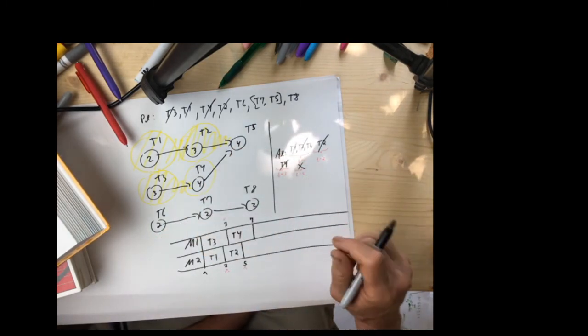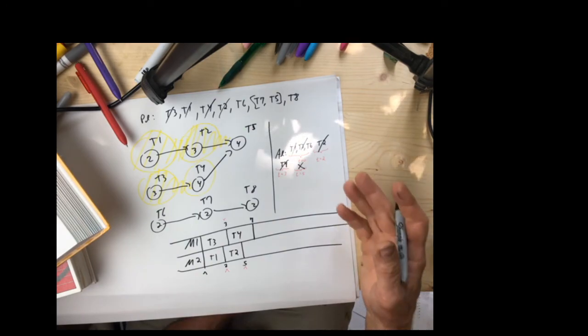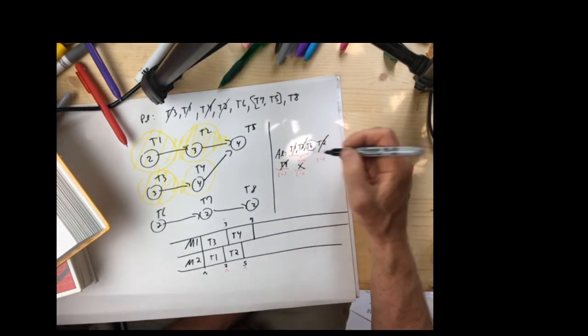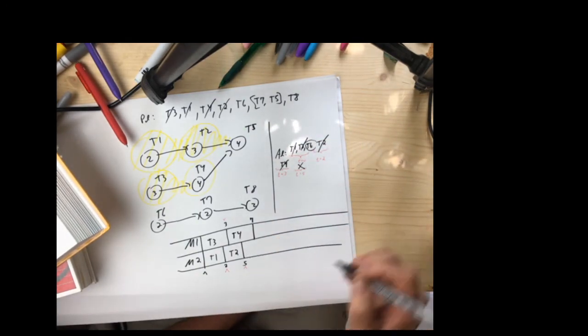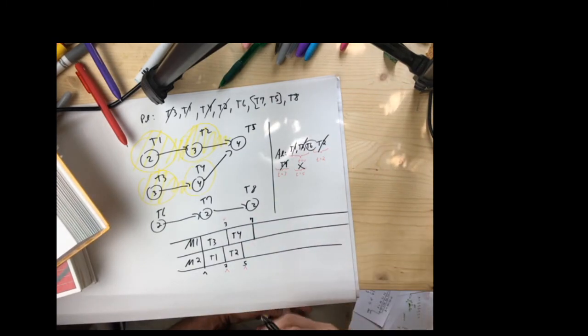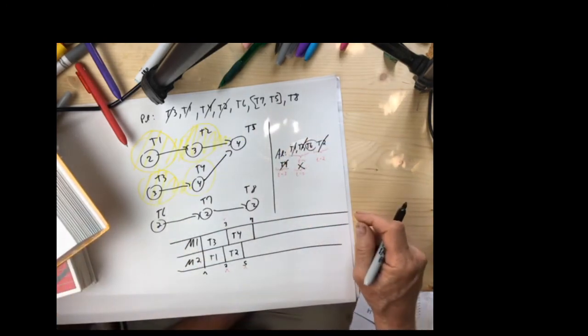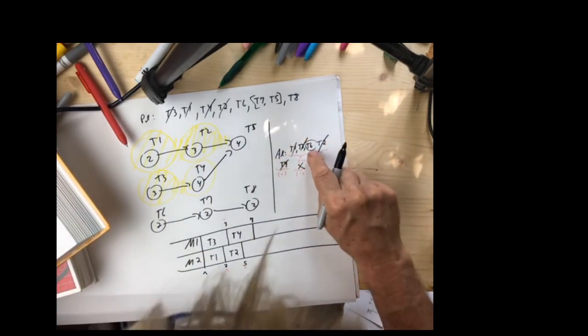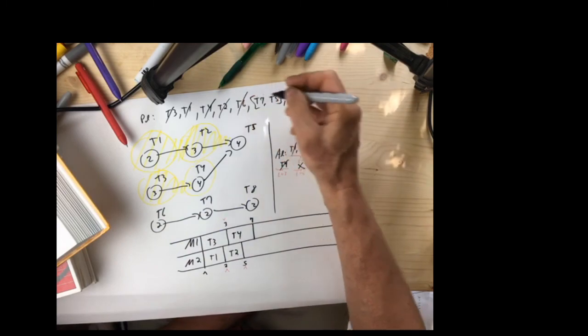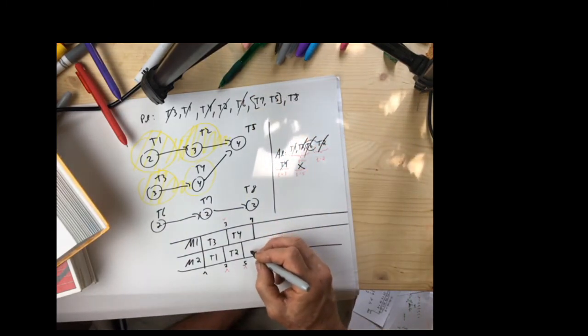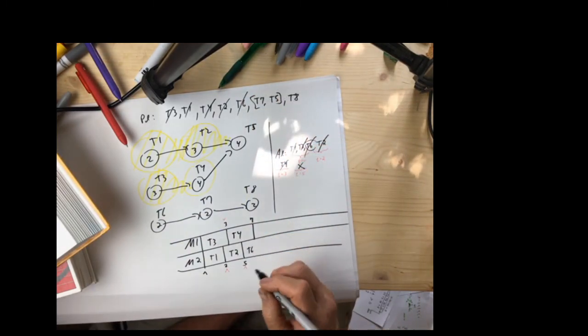T6 has been available for some time. So our available list contains exactly 1 job. There's exactly 1 person waiting at T equals 5. No need to check the priority list. If you did, you discover, oh, 6 is the only thing on the list that I'm interested in. T6 is the only thing. I cross it out, and I drop in T6.